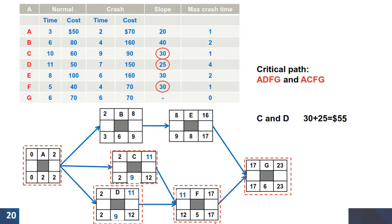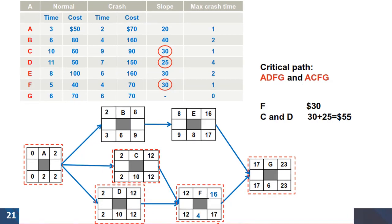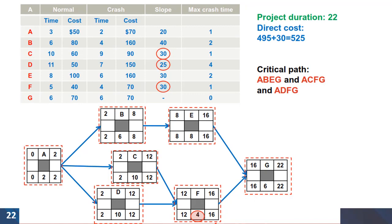Following the steps again, the choices that we have are shown on this slide. As you can see the two parallel critical paths are ACFG and ADFG. We can select activities C and D on each of the paths and the slope for this choice will be $55. Or we can be smarter and select activity F which is a merging point for the two critical paths. And the associated cost is only $30. So this is our choice.